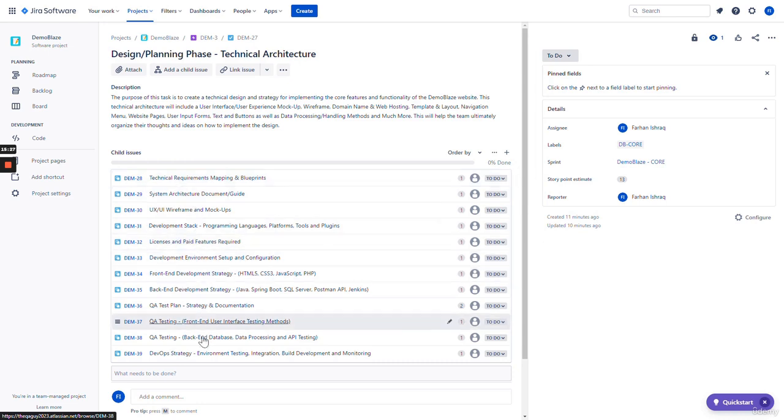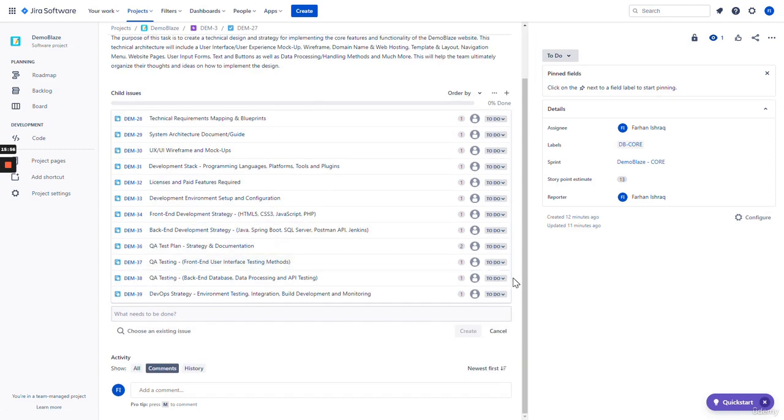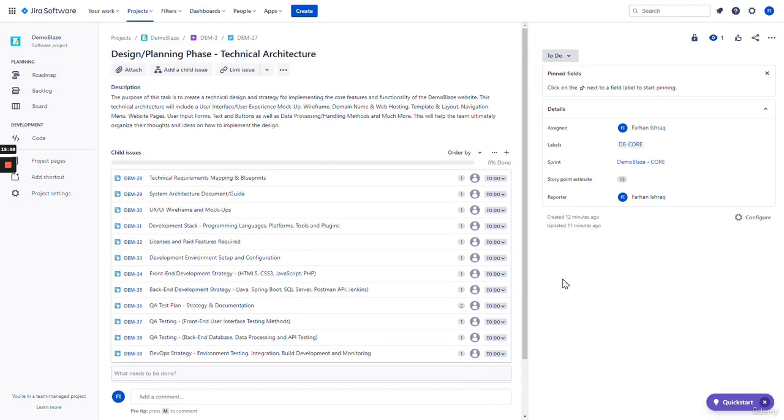As each of these subtasks are completed from a to-do workflow to a done status, this percentage will be updated from 0 to 100% at its time of its completion. With 13 story points distributed across several different areas or members of the team, from development, QA, design, and DevOps, you'll be able to track and see the progress every single day in the sprint lifecycle.